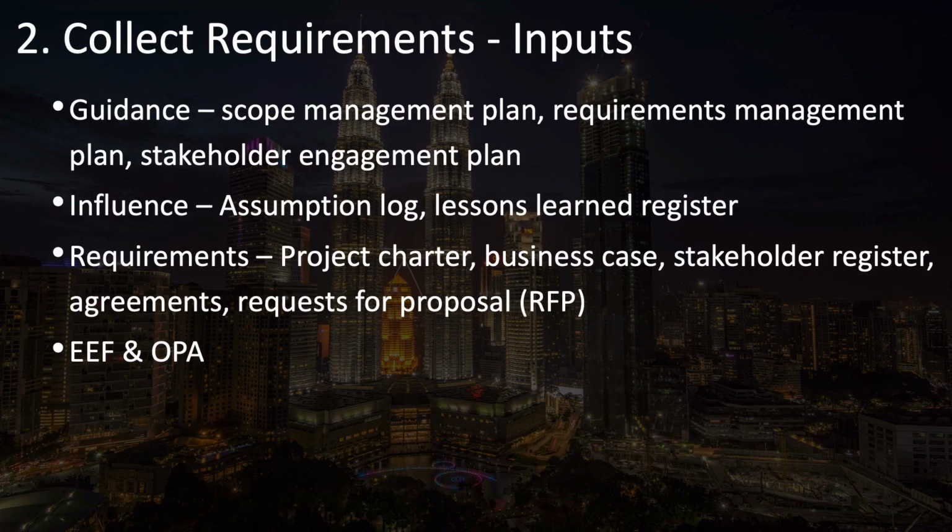Those things that can influence your project and its requirements include the assumptions log, because all of the assumptions about the product, the project, its environment, stakeholders, even the industry or the market, and the consumers and the economy can all affect your requirements.